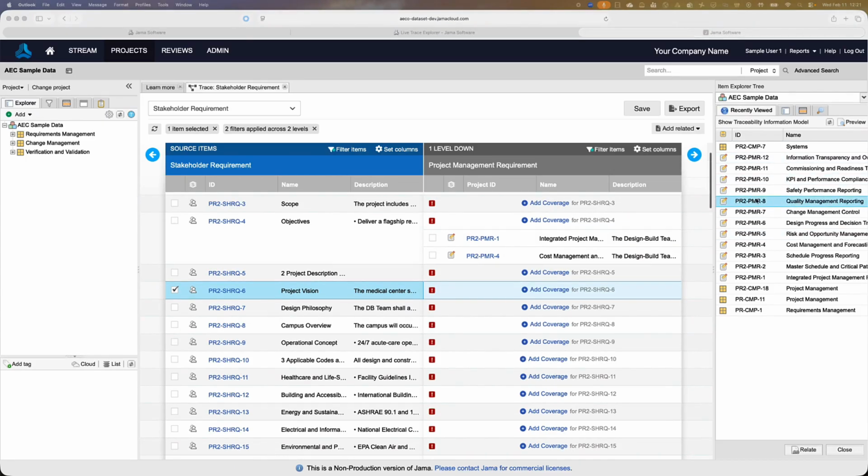So you can start to see how traceability is key to building a defensible audit trail. These relationships between requirements show how and why design decisions were made through the decomposition and allocation trail, and also enable better impact analysis so that you can respond to change orders with confidence.